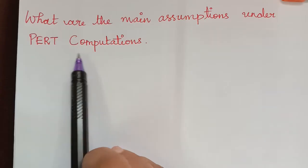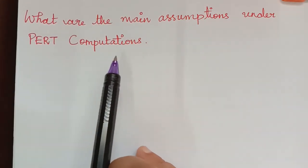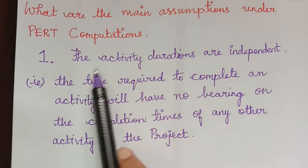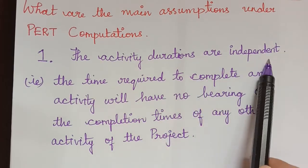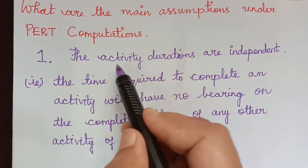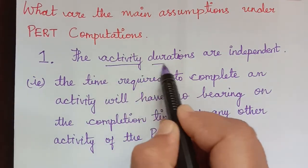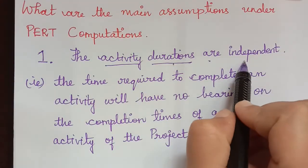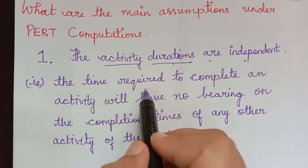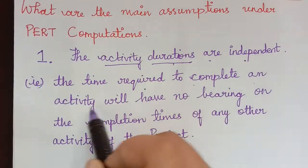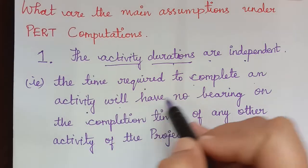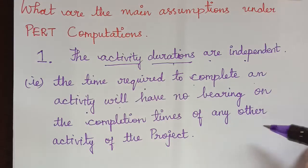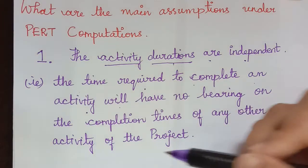The first assumption under PERT computation is that the activity durations are independent. So we know we have activity durations. Those activity durations are independent. That is, the time required to complete an activity will have no bearing on the completion times of any other activity of the project.